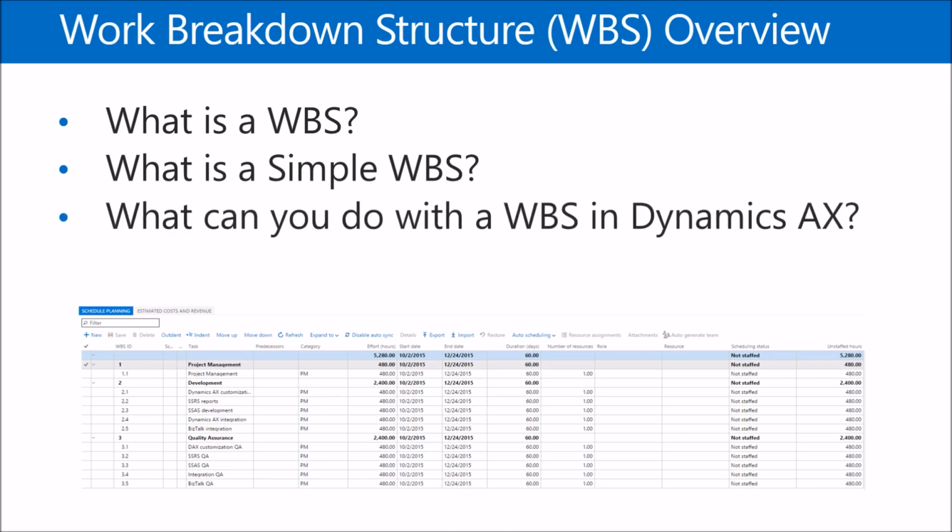So what can you do with a work breakdown structure in Dynamics AX? So let's just talk towards the slide a little bit. First of all, when you open the work breakdown structure form, you're going to be able to go in and define different tasks. And tasks are interchangeable with the term activities as well, because when you create a task, it creates an activity. But you can create a task, you can define that task name, and then you basically can go in and also define how much effort is involved in that specific task, and then the start and end date for how long that task is going to run.